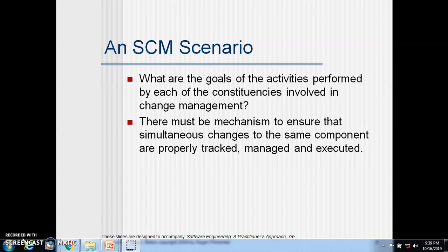To implement techniques for maintaining control over code changes, this manager introduces mechanisms for making official requests for changes, for evaluating them via a change control board that is responsible for approving changes to the software system and for authorizing changes. The manager creates and disseminates task lists for the engineers and basically creates the project context.